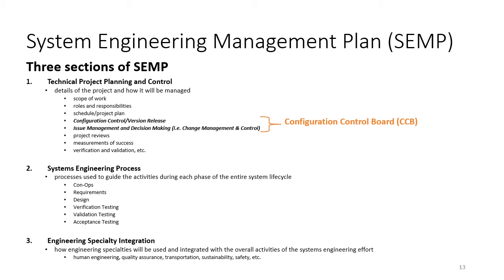The configuration control board is where difficult decisions are resolved, especially close to the end of the project development phase when deployment is near. The second SEMP section is engineering processes — the processes guiding all lifecycle activities: concept of operations, requirements, verification testing, and so on. The third section is engineering specialty integration, ensuring that safety analysis, human engineering, and quality assurance are all embedded in the design of the system.